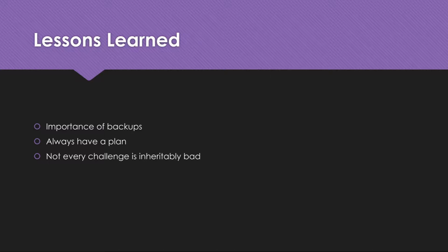For example, when I was working on the networking, I didn't actually have any of the proper cables for the day I wanted to do networking, so it actually took a day extra just to get started there. I should have actually looked at the hardware and figured out all the cables needed and necessary to hook up before I planned on doing networking. I will keep this lesson with me for the future.